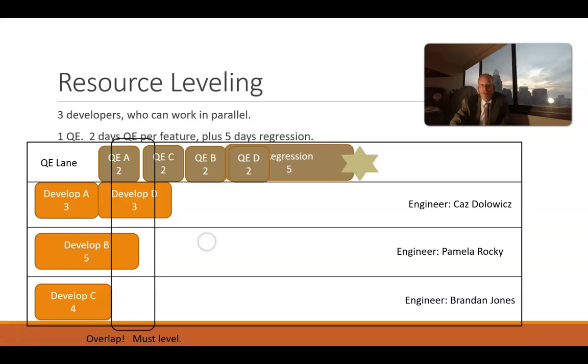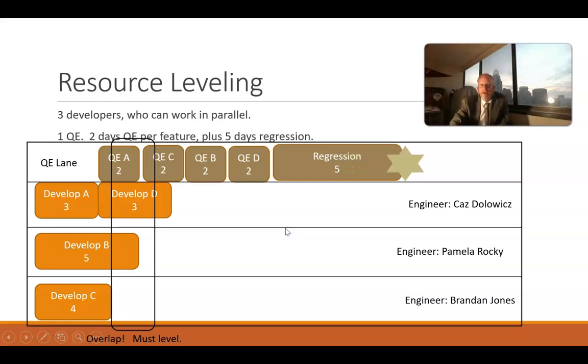So with resource leveling then, what we'll do is say, okay, well, let's do these in sequence and then let's delay regression until that's all complete. The consequence is it does indeed move our end date for the entire project.